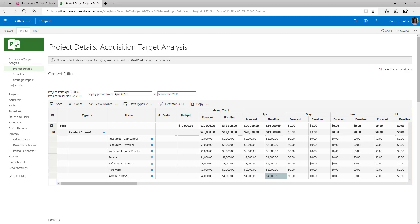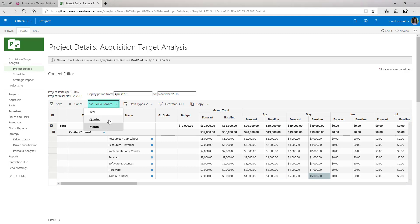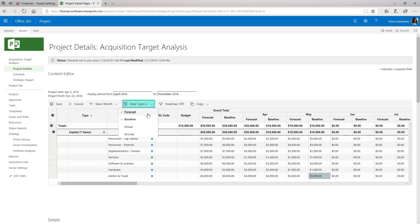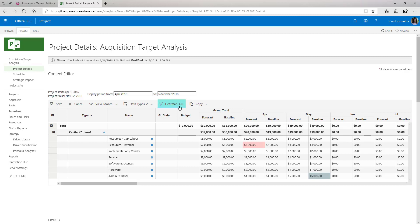Several options are available on the budget table as well. Here you can select the period of time for which you perform budget planning. You can add data types if needed. If the heatmap option is turned on and the forecast number is greater than baseline, it will be highlighted. Copy option allows to copy forecast numbers to baseline and vice versa.